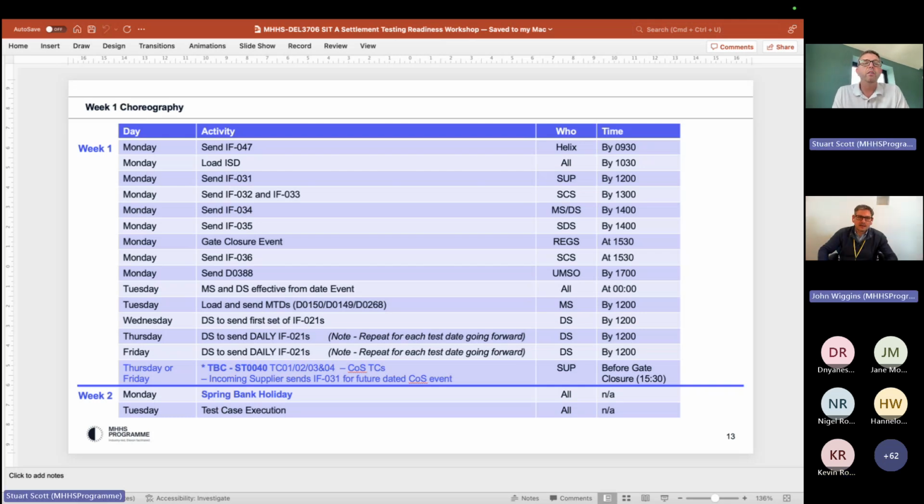It's not the end of the world, and I guess to mitigate that point, it's probably worth having the conversation within your cohorts about which ones to do, because obviously you've seen the plan going forward. For example, if you've got the MPANs migrated to support the ST40 test case, because that's the first one we want to start on, it would make sense to start with those if there is a risk of not being able to do all of them effectively, because then we're prioritizing which MPANs we're migrating ready to start the test cases on.